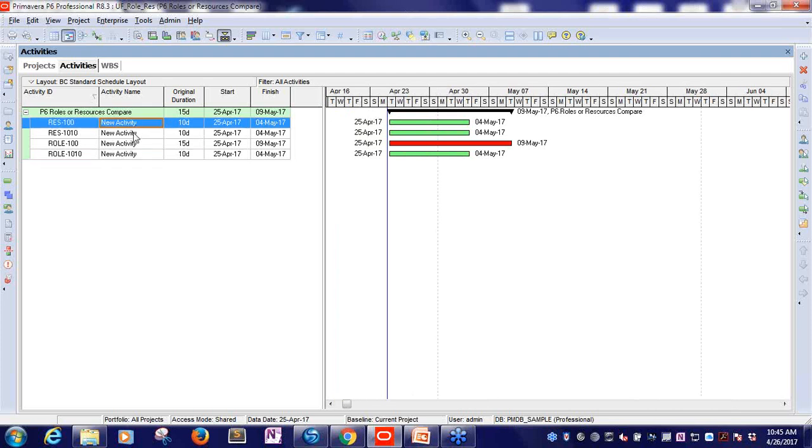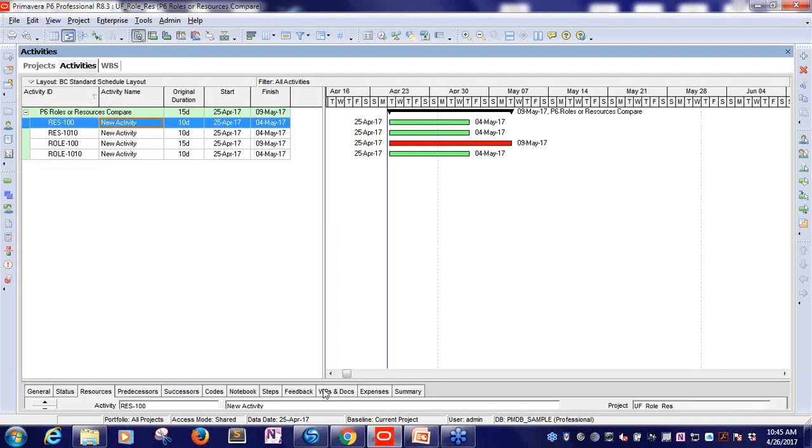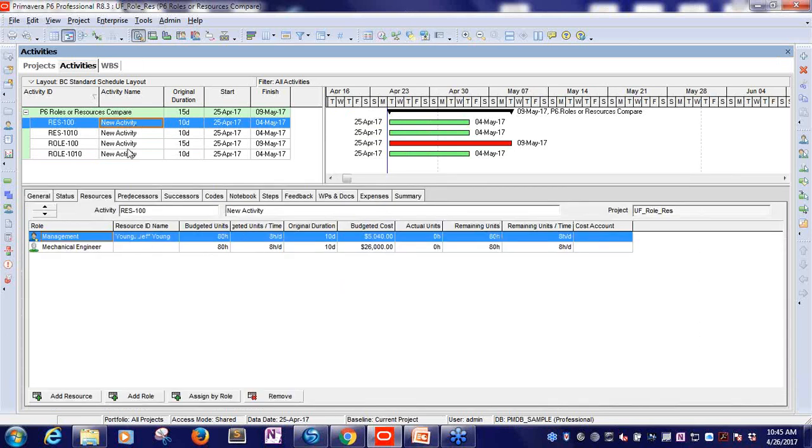And so here we have our activities, and we have some resource assignments for the activities. What I'm assuming the question would like to do is to say, I've got an activity here that's a 10-day duration, but I would like my resources to either span a longer duration or perhaps even a shorter duration. So in looking at just the duration, right now when I update the original duration here in the resource, it's going to automatically link to my P6 activity.